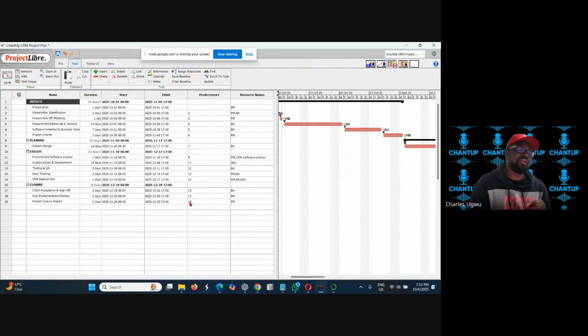So they must have a copy of your project plan. It's their project. Yes, you are managing it, but it belongs to them. They need to have a copy. Once they are happy, you baseline it. And once you baseline it, it now becomes the authoritative document you can use for your project. So, yeah.